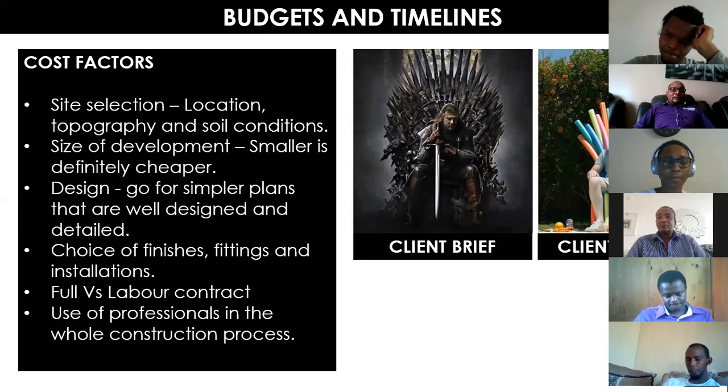Because at times someone would see 5 meters on a drawing, they would think it's adequate, and when you start building it up, then they say, no, this is too big. So when you engage consultants and utilize them properly, you're able to make all these decisions on paper. And once you've locked it and you've gone to site, if you're able to implement your project without having to do any changes, without making any amendments, then it ends up being much, much cheaper than the other way around.